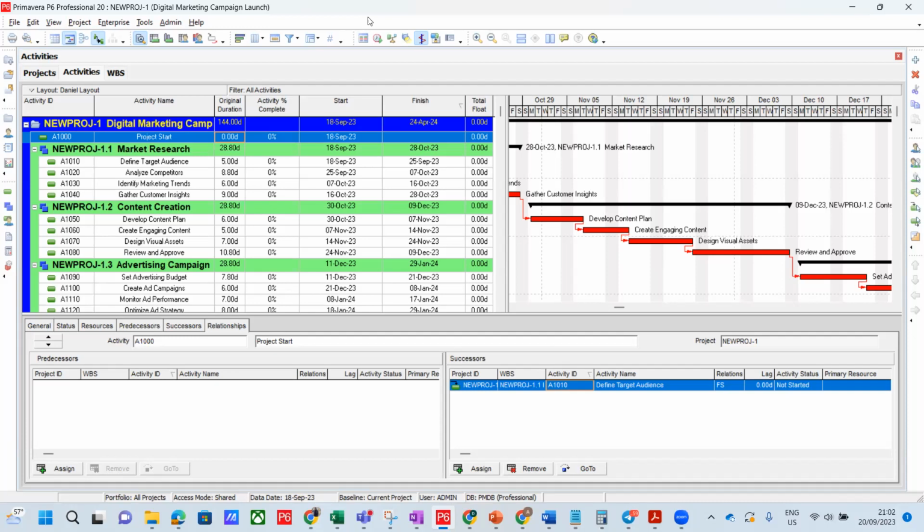You are talking, John and David, they are mechanical engineers. Ade and Daniel, they are electrical engineers. So you can assign at role level, if you don't know the actual person that you want to assign to that job at the beginning.